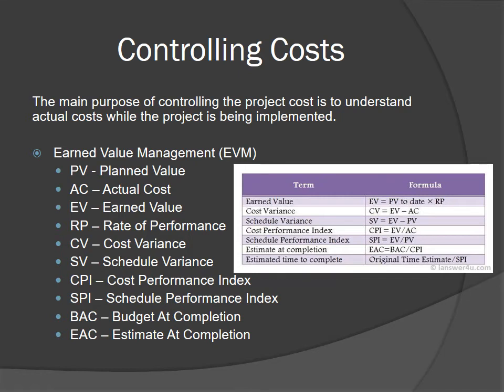Controlling costs is an essential component of project cost management. It includes monitoring cost performance, ensuring appropriate project changes are included in the cost baseline, and informing project stakeholders of authorized changes that may affect costs. There are inputs and outputs that are factored in controlling costs. Inputs consist of project management plans, project funding requirements, work performance data, and organizational process assets. The outputs of this process include work performance information, cost baseline, cost forecast, change requests, project document updates, cost management plan, and organizational process asset updates.